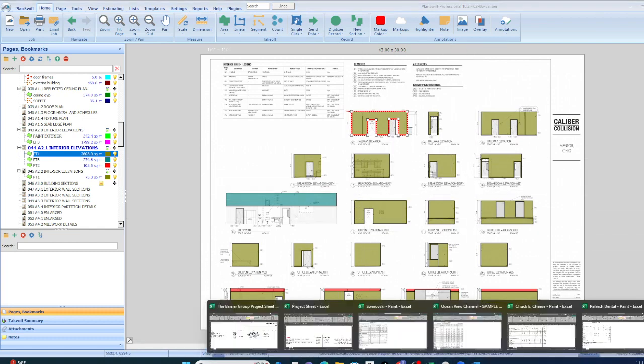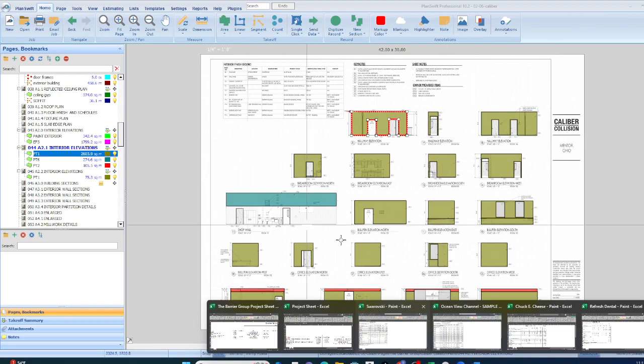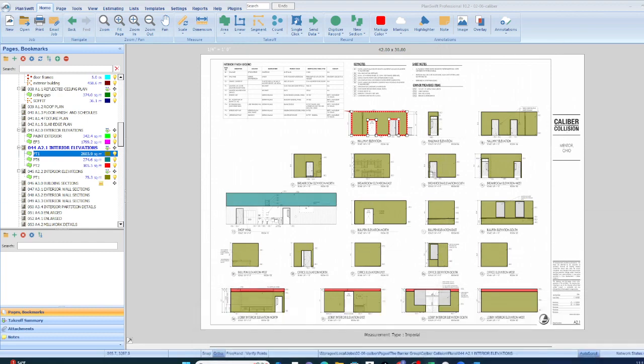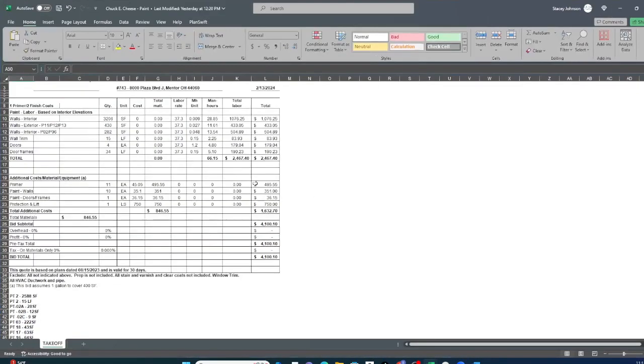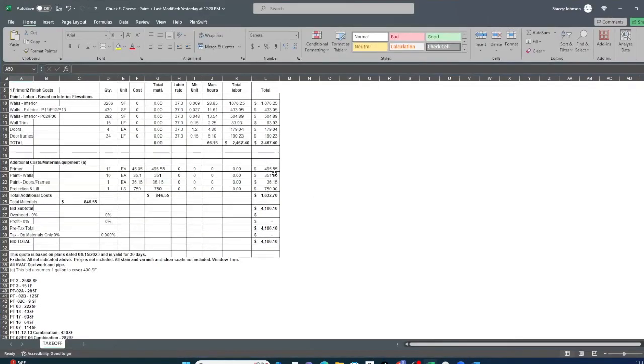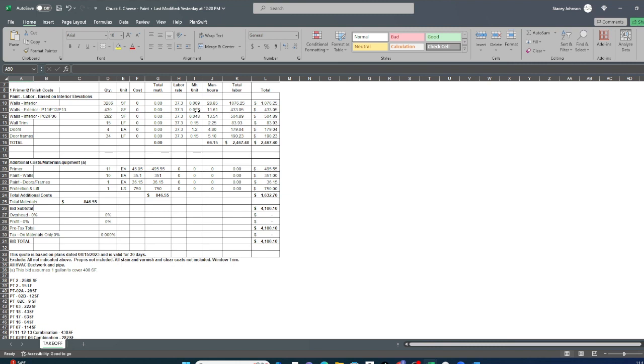So now, you can buy this. Now this is caliber collision. The one that I'm going to show you actually, is for a Chuck E. Cheese paint estimate. So after we did all the takeoffs, interior walls, exterior walls, some of the walls had like strips and where it takes a whole lot more labor. And so in those cases, we increased the man hour units. And this is the time it takes per unit, one unit square foot. So we get that from our cost book.